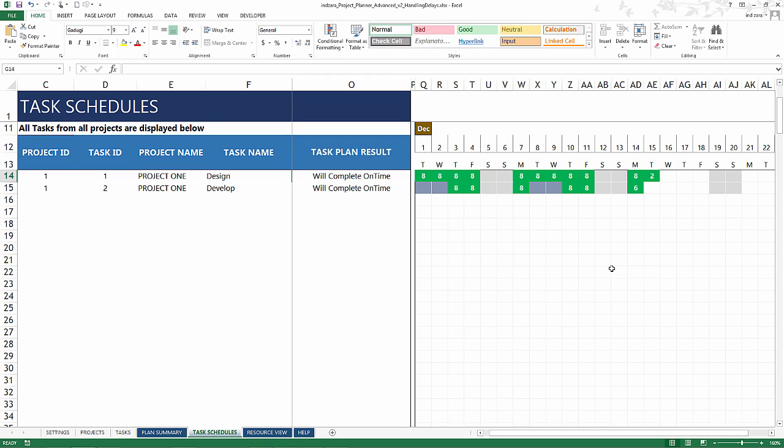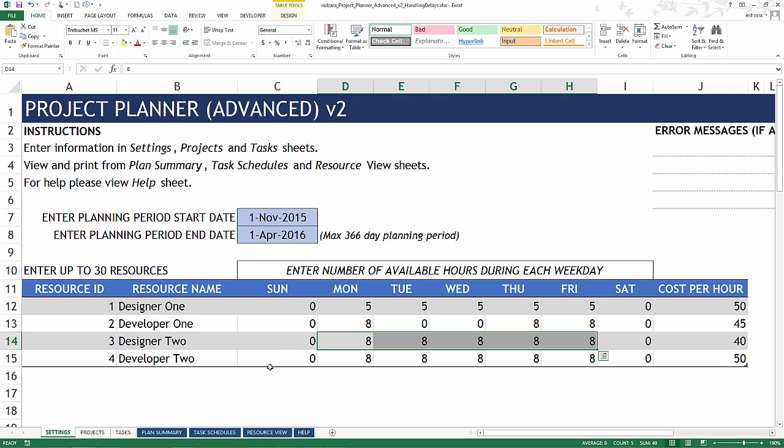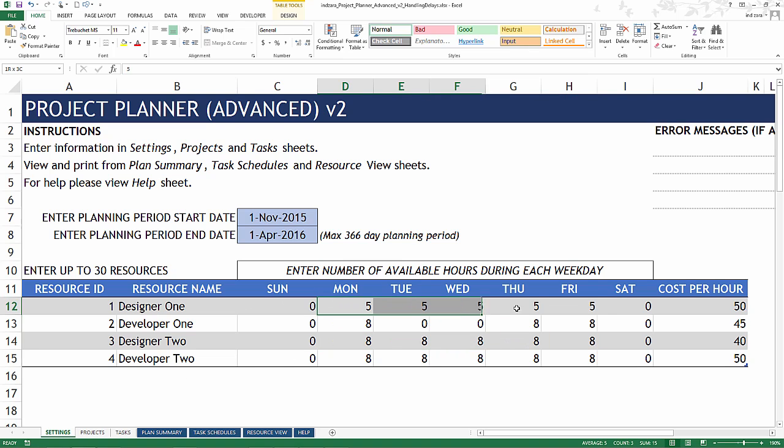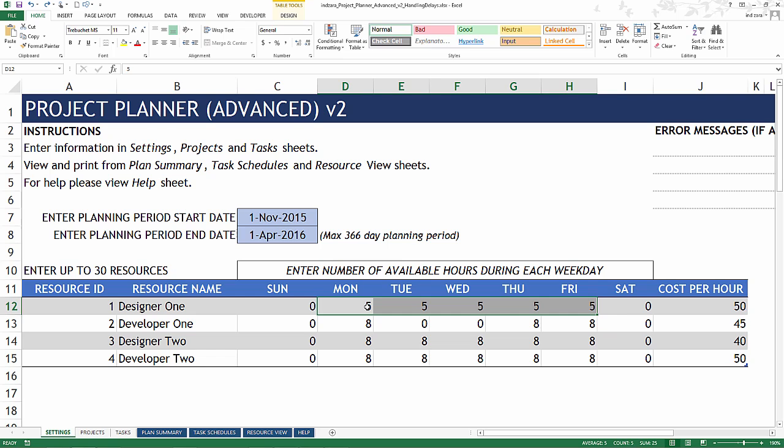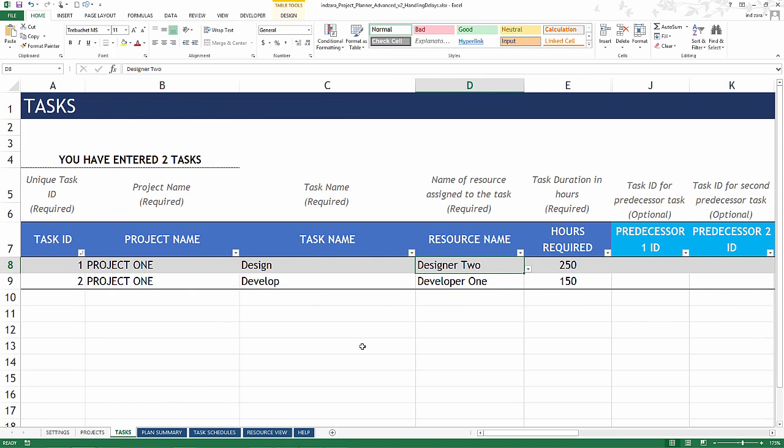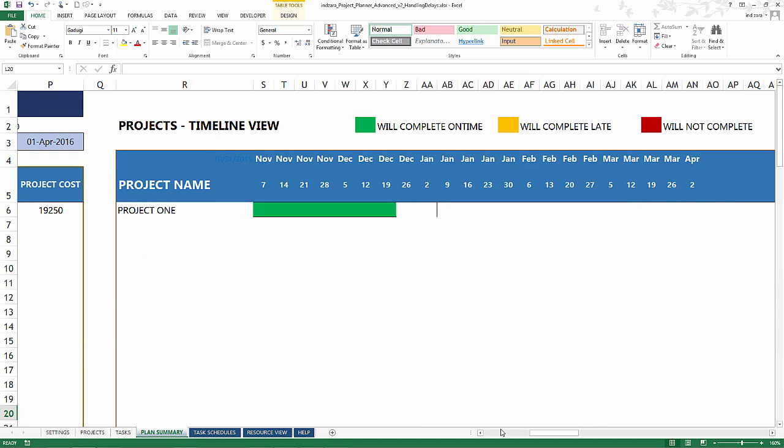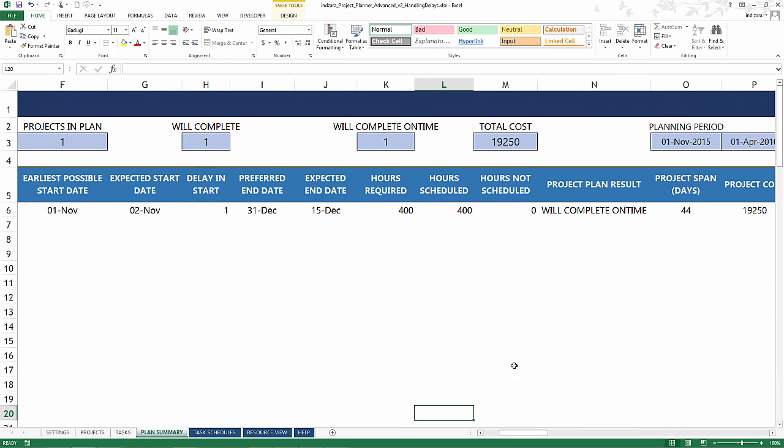You can also address it in another way if you have the option. If you can ask this designer to be available more hours every day, that could work too. So for example, if we can ask Designer 1 to be available more days during the week, I'm going to select all this, press 8 and hit control enter. Now it puts 8 in all these cells and now Designer 1 is available 8 hours every weekday. So clearly now we can go back and reassign this task to Designer 1 and we will still get the same result, which is the project will end on 15th December, will be on time, so everything is good.